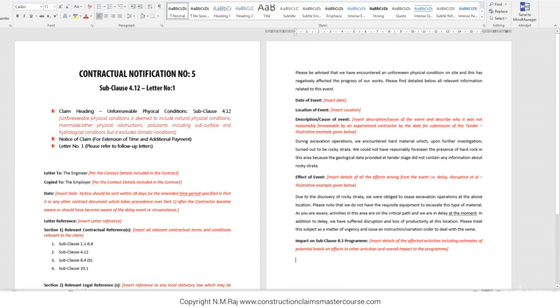Next, mitigation measures. In general, a contractor is obliged to mitigate delay and cost, but this does not equate to spending additional sums of money. However, any reasonable sums expended for mitigation measures undertaken to reduce serious losses is recoverable under most jurisdictions.